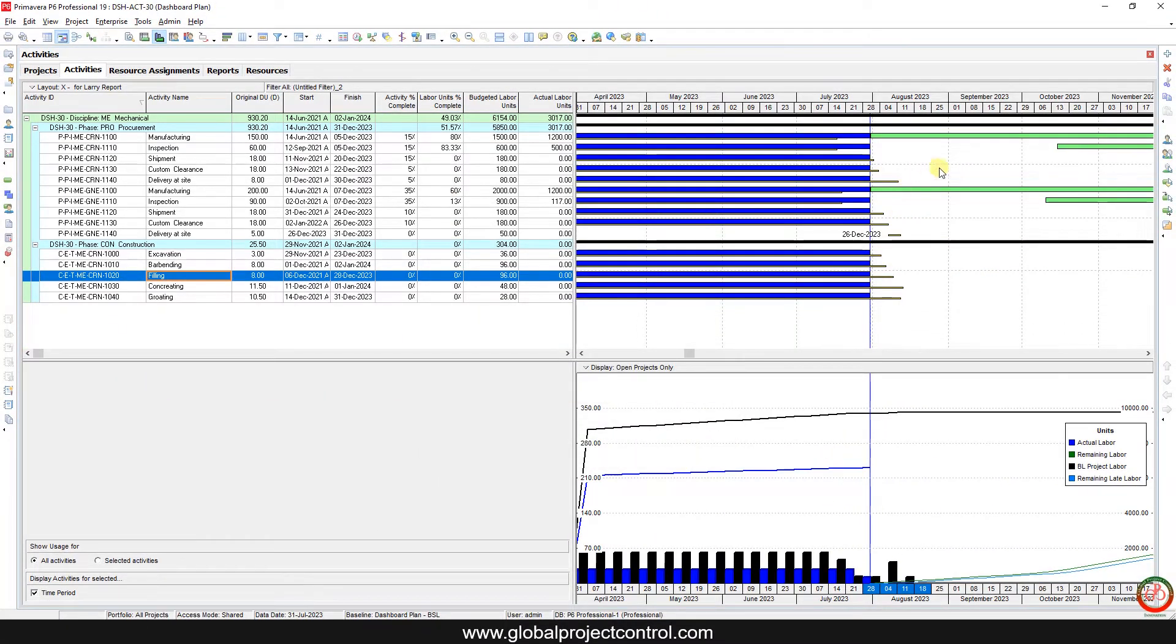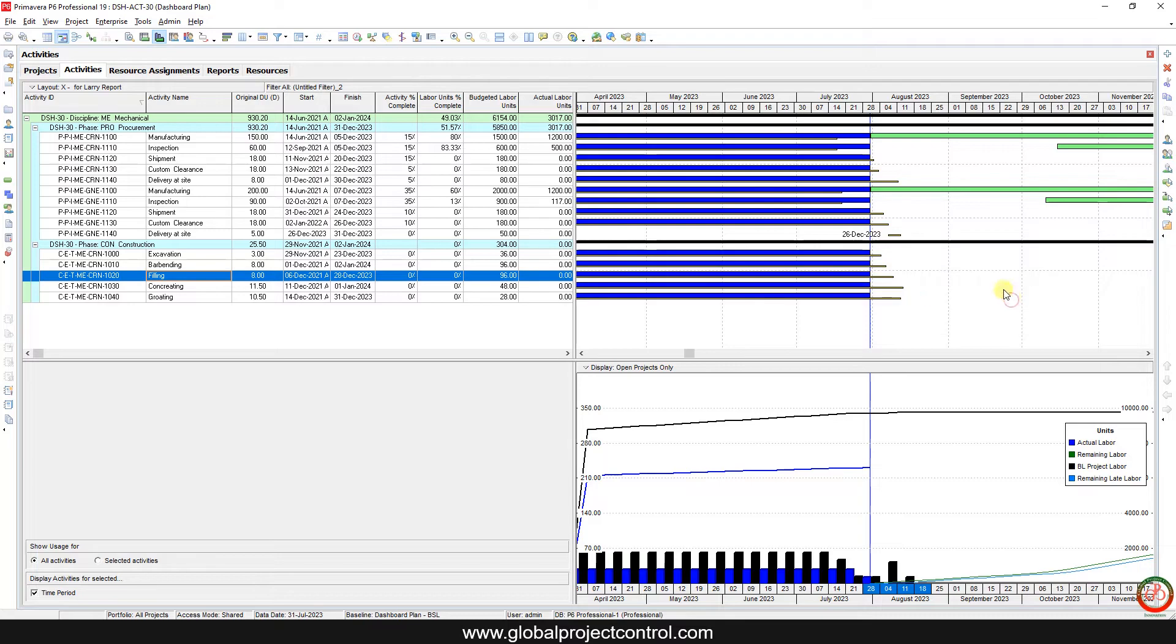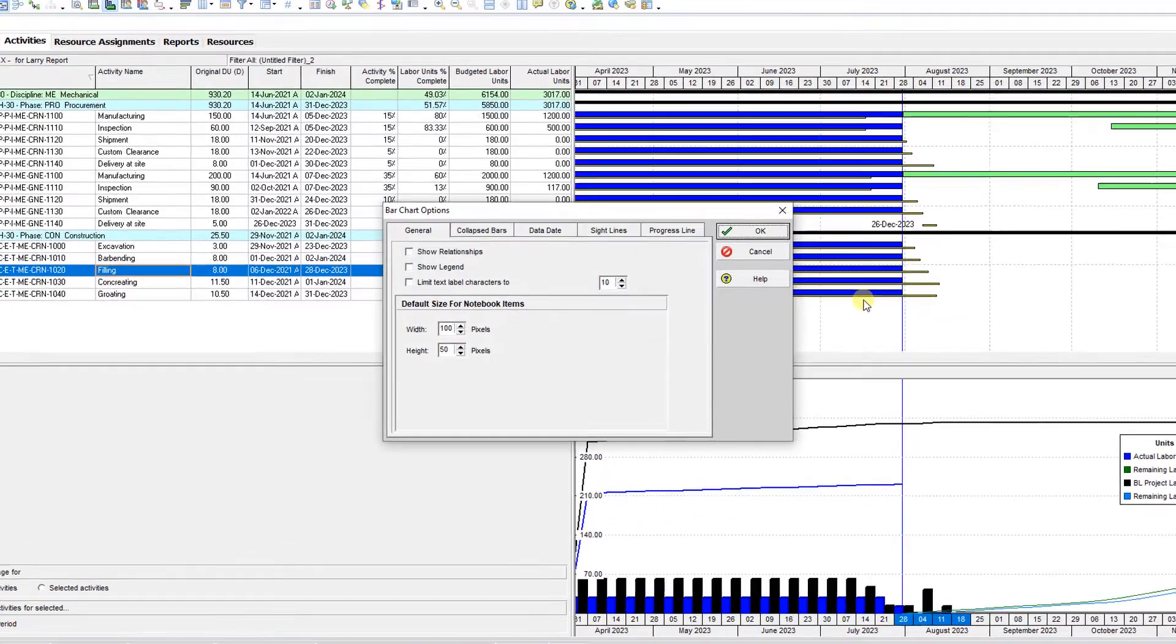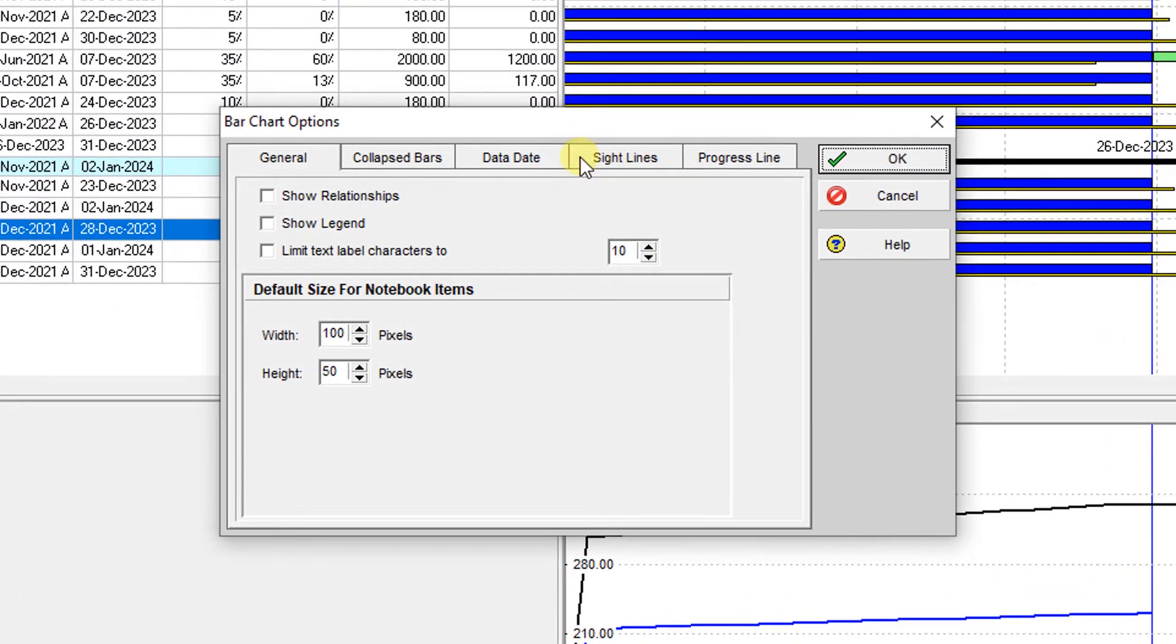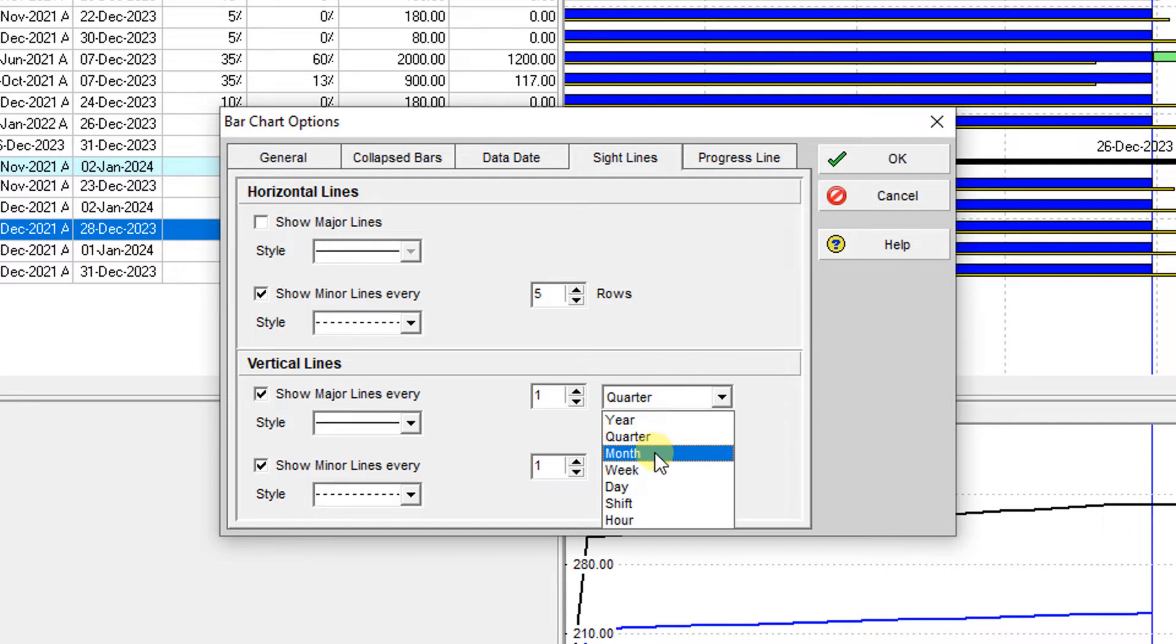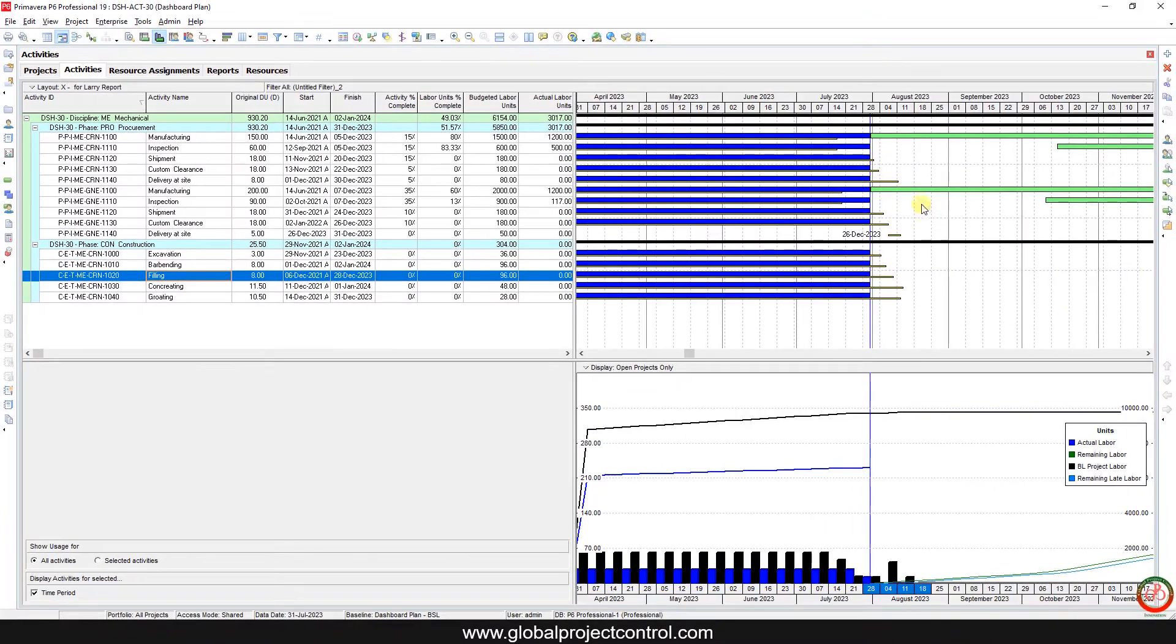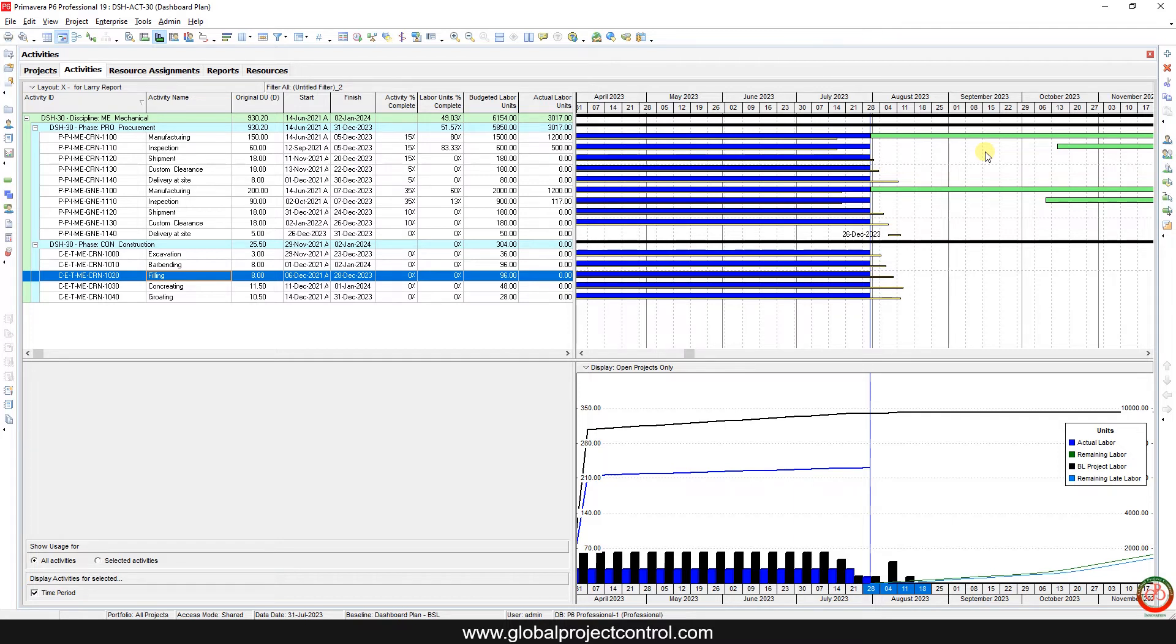Now I have a look-ahead plan for the mechanical, but if you want to know where this task is going to start, when this task is going to be finished, then it is better to go to the bar chart option. From bar chart option, go to the site lines and add some major line for every month and add some linear line by every week. Then you can easily scroll and find out what is the estimated start and estimate finish. But maybe it is good idea if you want to print it out.